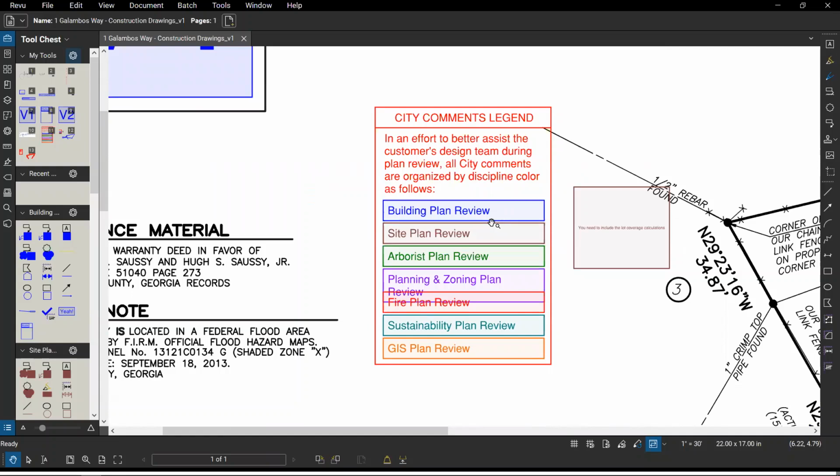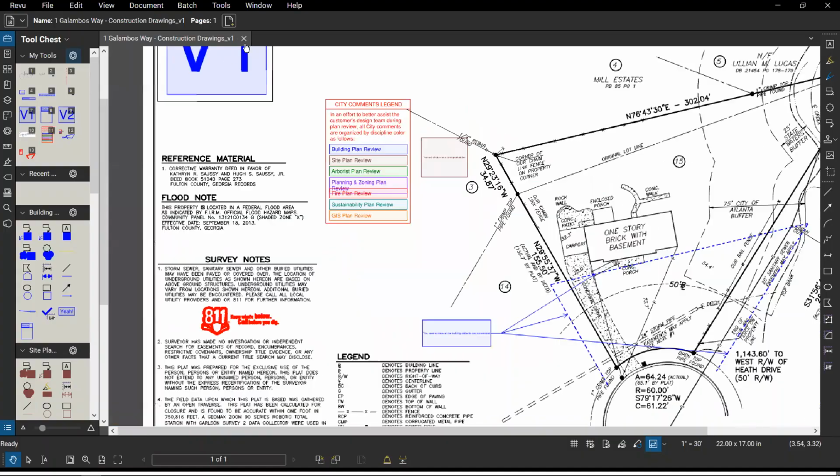That's the intent. Like I said, we're trying to make it a little bit easier, a little bit simpler for you to distinguish, because we have had instances in the past where, say, the architect didn't know whose comment was whose, and they start fixing something that was not broken. And then that causes a conflict in the drawings. And then we're going back and forth with it. And then everybody gets confused. So this is our attempt to try to make it easy for everybody. All right.